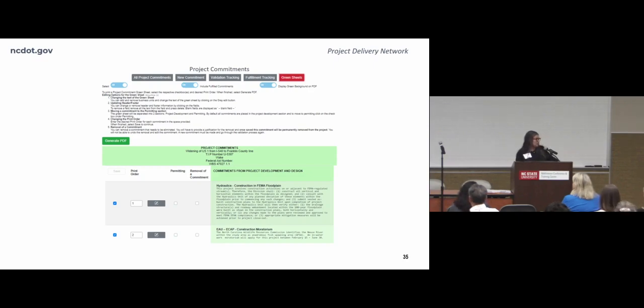It can be a project commitment as in we have a school and we need to have the road closed only during summer, and so we are planning for April letting so that when we get delayed or we have something come up and we say, oh, we need 6 more months, and everybody forgets that we've made a commitment that we have an April letting, this is the place to capture those types of decisions.